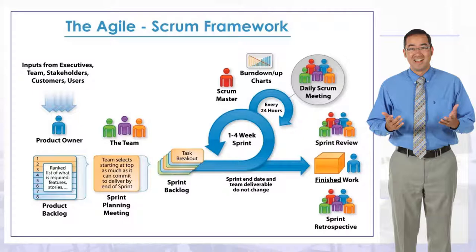A couple of new terms: the product backlog, the sprint planning meeting (a stand-up meeting), the sprint backlog, and iteration cycles of one to four week sprints. You can have a daily stand-up meeting called the daily Scrum call with your team members. The project manager typically does not lead this meeting — the Scrum master leads it. The PM takes notes, ensures everything is recorded, answers questions, and looks at issues.